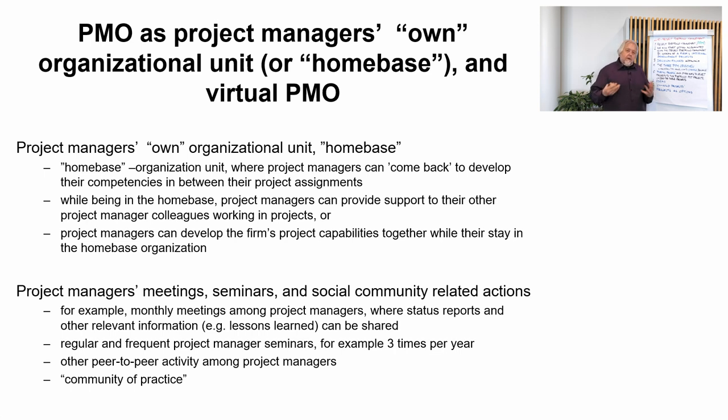Then another item, at the lower part of this picture, is the project managers' meetings, seminars, and social community-related actions. There could be, for example, monthly meetings among the project managers where the statuses of the projects are discussed and some lessons learned are exchanged. This might be more worthwhile and more effective than having lessons learned workshops at the end of the project. If we do that on a monthly basis, then each and every project manager also remembers those cases which were close to happening, unfavorable events or risks, and shares them with others.